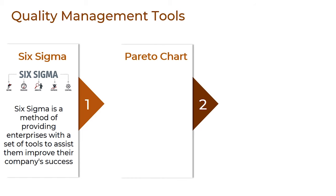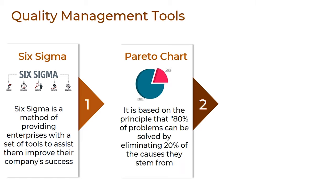Next, we have Pareto Chart. The Pareto Chart is an analysis tool. It is extremely helpful while making decisions based on priorities. It is based on the principle that 80% of problems can be solved by eliminating 20% of the causes they stem from. This means that with a few corrective actions, a large number of deficiencies can be resolved easily. This chart is similar to a bar chart and is commonly used to identify the key factor or factors in a problem, to determine the main cause of a problem, to build a method to improve the elements, and to ascertain whether the desired effect has been achieved or not.